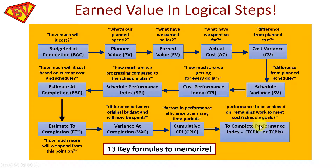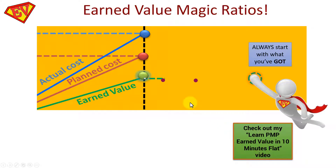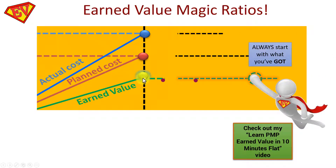When you get into the exam room, grab a sheet of paper and scribble down your three main metrics: Actual Cost at the top, Planned Cost in the middle, and Earned Value at the bottom. This gives you a quick understanding of the variances. For those still unsure about what earned value is, check out my 'Learn PMP Earned Value in 10 Minutes Flat' video on YouTube. The most important rule: always start with what you've got — Earned Value is your frame of reference.